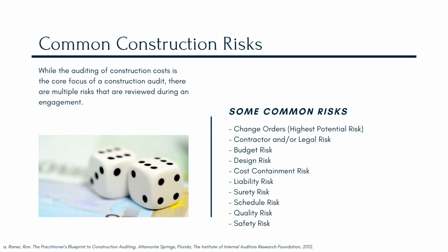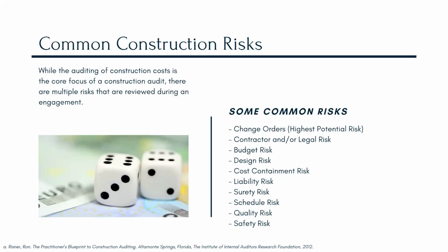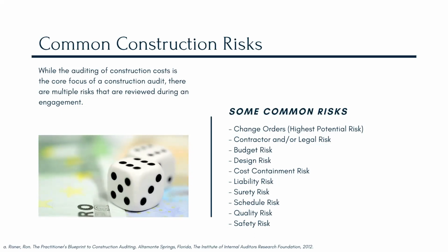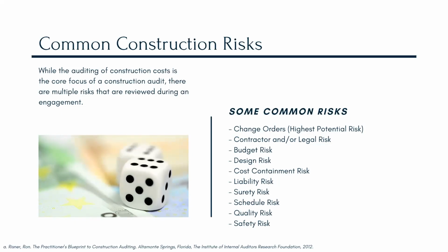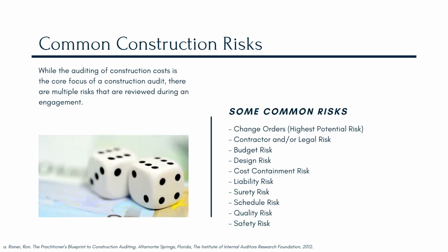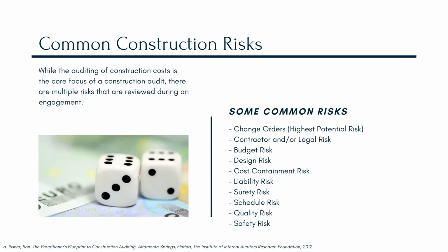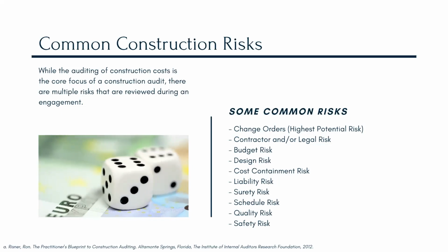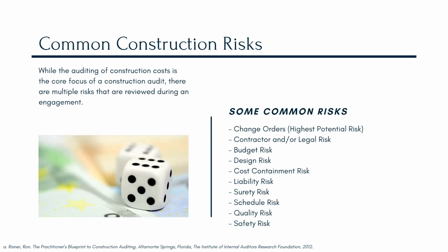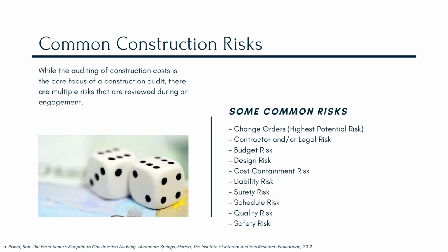The second resolution is ensuring that type of issue doesn't continue if it's a prepay, right? Yeah. And it's training, it's identifying the root cause of that issue and explaining to the general contractor, or whomever's being audited, what happened, what we saw from the audit perspective and why it resulted in a finding, and discussing with them, or letting them take it to their team and having internal discussions, how that can be resolved.